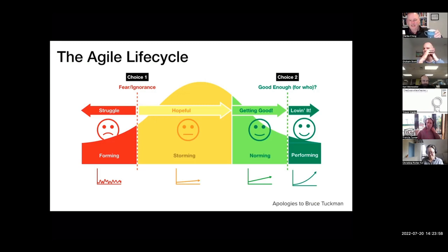And the senior civil servant said, "No, I'm convinced they've pared everything back to the bare minimum that they possibly can." And then the next morning I came in and I found her sitting with a cup of coffee and the IT director explaining the analogy, and saying she'd looked into it and actually, no, the teams are building the best products, but they were running out of money and they unfortunately had to start building not the best products, but the good enough products, and they had to pare it back. Ideally, they would have had these discussions a year earlier when it was easier to do that.